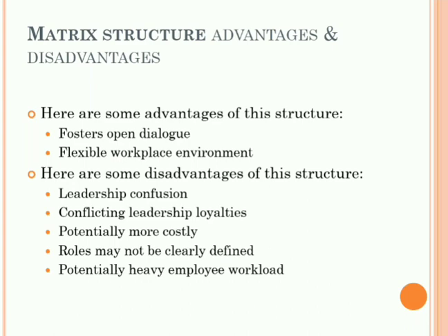As you move across the spectrum from functional to matrix to project-based organizational structure types, the organizations will move from favoring ongoing operations to favoring projects. Here in this type, as a project manager, you will have limited positional authority in this type of organization. You will need to rely on expert authority and referent authority to get project tasks completed. Because of this, you will need to develop your influencing and negotiating skills if you want to be successful.